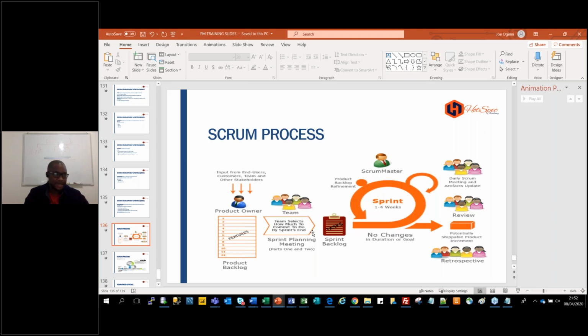Subject matter experts means leaders from each of the executing teams: project managers, the BAs, maybe the program manager, the head of the Oracle department, Oracle developer, head of Java developers, head of COBOL, all sorts of heads of each SME area needed to deliver that. They need to be there because they will give you the best estimate to deliver. Oh, that can be done in 1 day. That's 2 days. Because you don't want to package something that can be delivered in days. So they can say 2 days, 2 days, 4 days, 5 days, 7 days, 8 days, which makes up 3 weeks. That's a sprint. Let's go on and execute that.